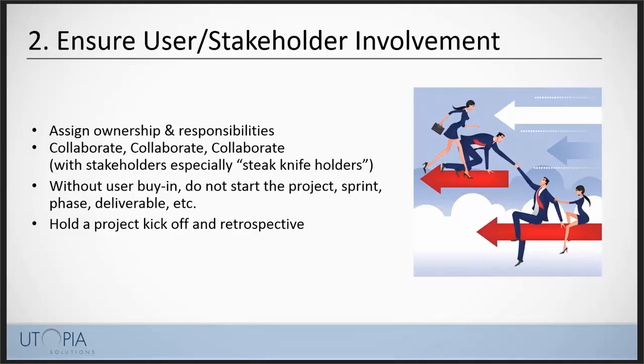So it's really key. As an example, I've seen a framework implemented for a company where all the primary stakeholders were in one department, and the rollout in that department went great, but there wasn't enough collaboration or buy-in when that framework was being rolled out to other departments of the company, so it was a lot more painful than it needed to be. The reason for that is the people that you didn't engage have unrealistic expectations. They're under-engaged stakeholders. It's a bad thing. So make sure that you engage everyone from the beginning of your project.